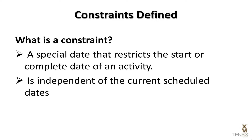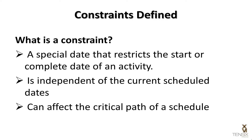You set this date manually to whatever date is required. It can affect the critical path of a schedule, and that is where the concern about constraint usage comes from in most of the guidelines for good scheduling.